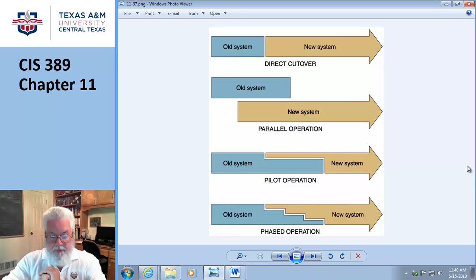Very cool. Recap all the system development cost, all the schedules, comparison of the actual cost to what you predicted the costs were going to be. And so this post-implementation evaluation, and then you go in and say, here's the whole thing. So that final report is sort of like that ISO checklist. You measured, you evaluated, and you did something with the evaluation. You actually made a decision based upon the output of that.